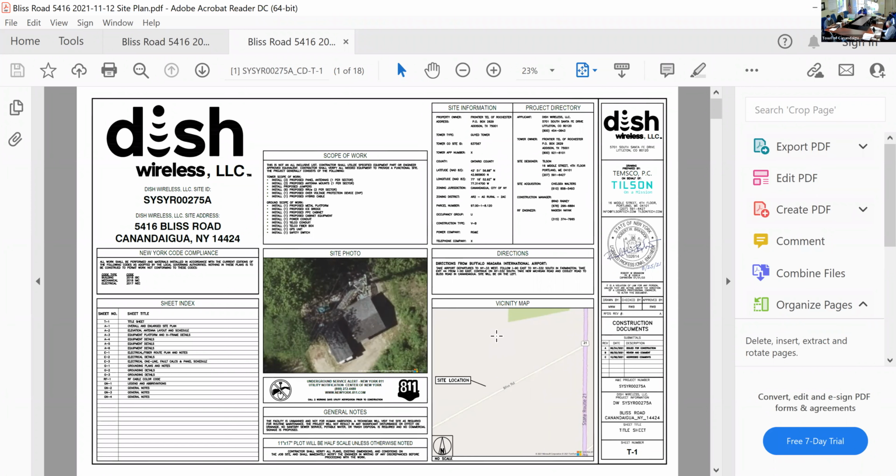So we won't be able to say this project's complete and push it to the planning board without it. Your site plan checklist will be incomplete. The part that I was a little confused on was anytime I saw that survey requirement, it said or engineered stamp drawing. So in New York State, an engineer cannot stamp or sign something with boundary on it. So we need something from a surveyor.